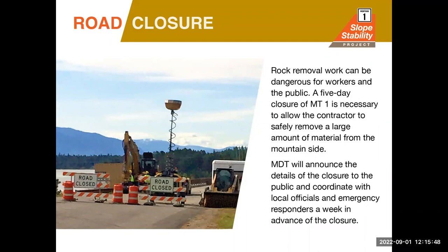The unfortunate part about this area is there is no feasible detour options available. MDT will not have a designated detour route to go around this project. During the closures, MDT will work closely with the local emergency services, the school district, the Forest Service and the county to ensure that they have access to get through the project if absolutely necessary in case of an emergency.